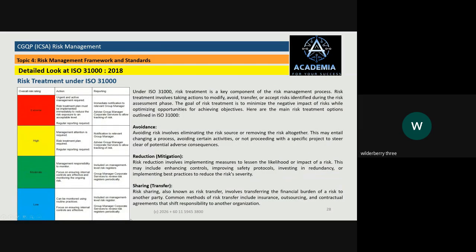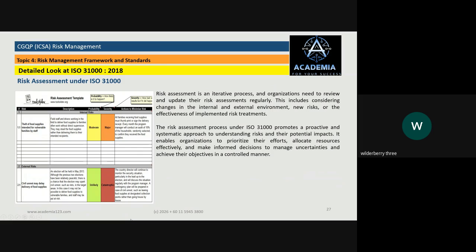Defining the principal risks is a bottom-up approach. You have to collect the elementary risks; there might be hundreds of them. You cluster them, and ultimately you find a maximum of 7, 8 principal risks, and that is what you really report on high level in your financial report. All others remain within the departments. And of course, you have separate reports, and it helps steer your risk landscape accordingly.